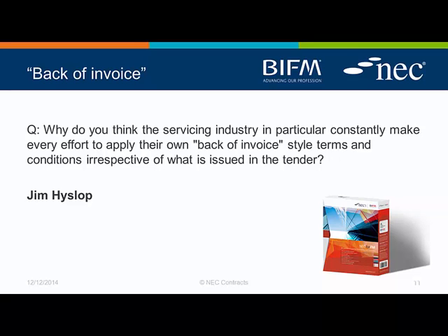term service short contract, and maybe the client in advance says, by the way, guys, just to tell you, you'll be getting the inquiry documents shortly. They'll be based on this form of contract. Go have a quick look at it and make sure you're comfortable with it. Any issues, give me a shout before I issue the inquiry documents.